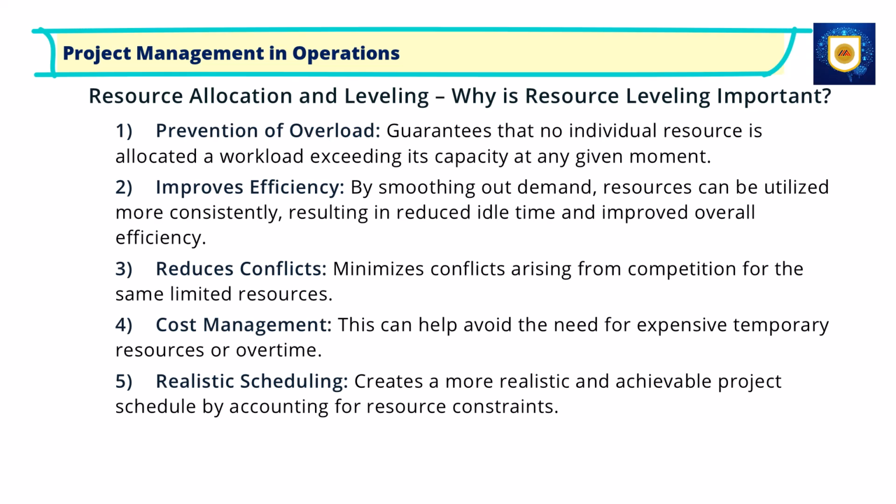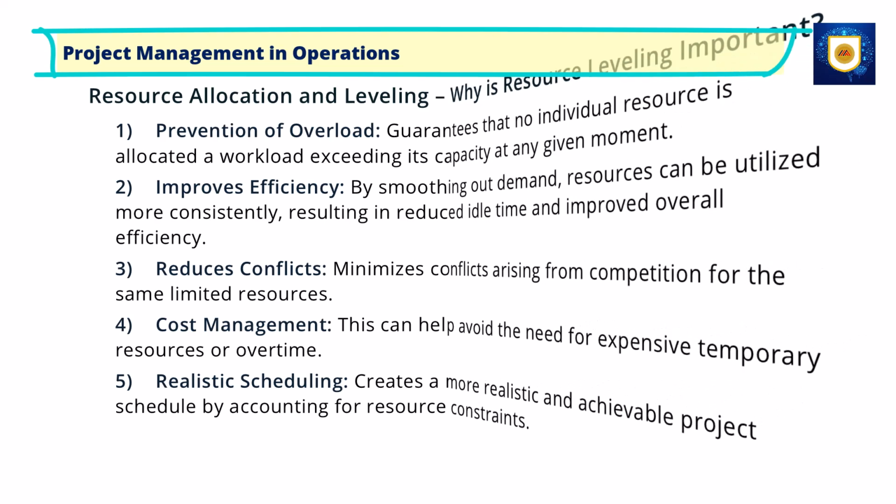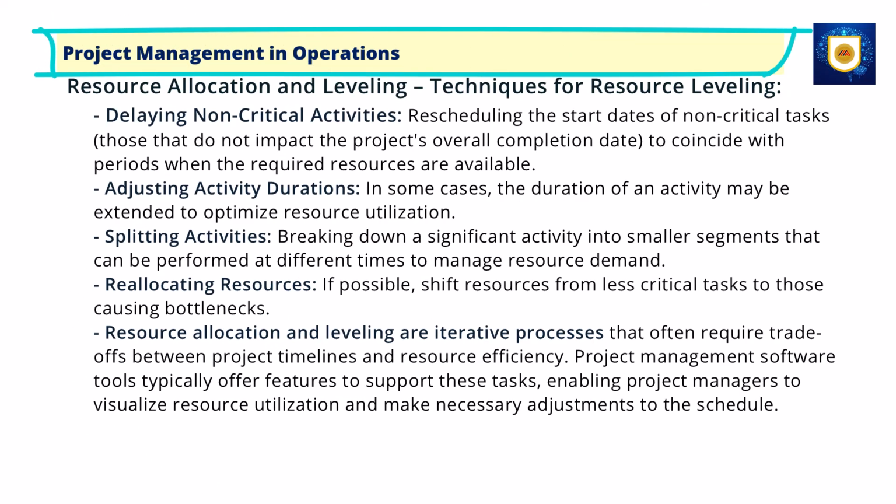3. Reduces conflicts, minimizes conflicts arising from competition for the same limited resources. 4. Cost management, this can help avoid the need for expensive temporary resources or overtime. 5. Realistic scheduling, creates a more realistic and achievable project schedule by accounting for resource constraints. Techniques for resource leveling. Delaying non-critical activities, rescheduling the start dates of non-critical tasks, those that do not impact the project's overall completion date, to coincide with periods when the required resources are available.